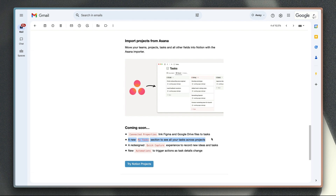My guess is that's going to be a little bit harder for them to implement for the existing databases. So if you don't have your system set up using these enhanced databases, then you might be waiting a while before you get access to that functionality too, which is obviously pretty valuable. To migrate to the new enhanced databases, you need to configure them so you have a set of properties that match your existing databases, then drag and drop your pages from one database to another. The only thing that will break is you will lose the link between your projects and tasks. There are ways to automate the migration and preserve that data, but I would need to go through that in another video — get in touch if that's something you need help with.